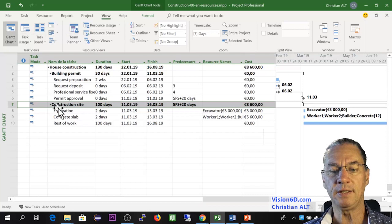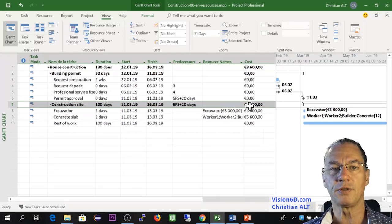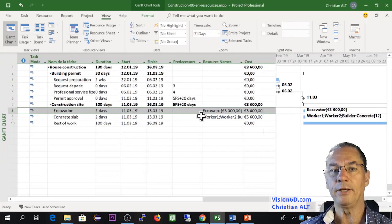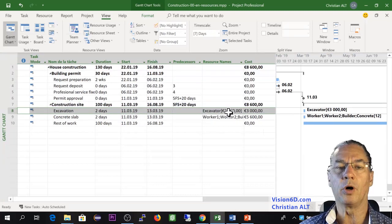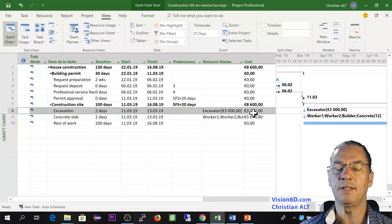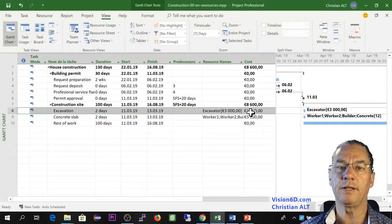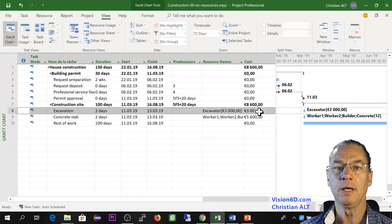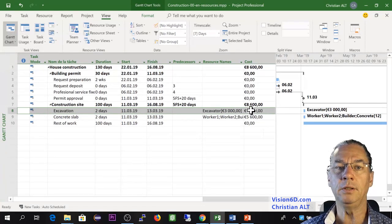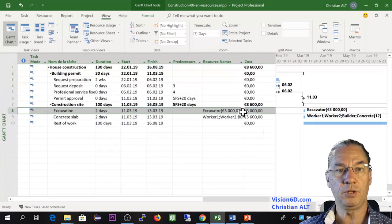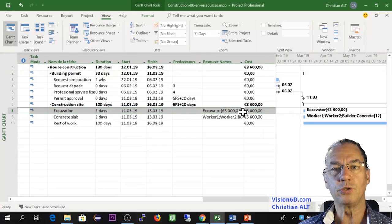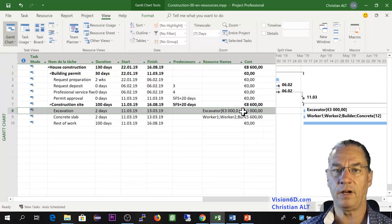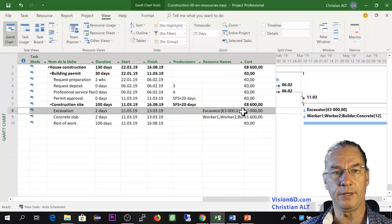I already hear some remarks where we say, OK, it's a cost resource, but in the end, it's twice 1,500. So it could also have been defined as a material resource with two units and each unit costing 1,500. This is right.